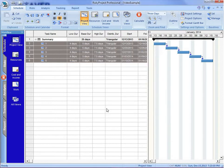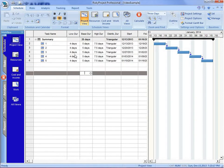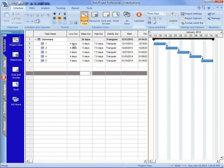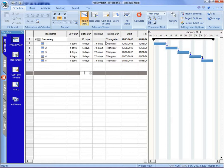Now one of the things that we want to understand is when doing Scheduled Risk Analysis, generally we'll have data that is right skewed. That means we'll have a triangular distribution that shows us that we can improve a little, but a bit more can go wrong. So that is very typical of a Scheduled Risk Analysis.